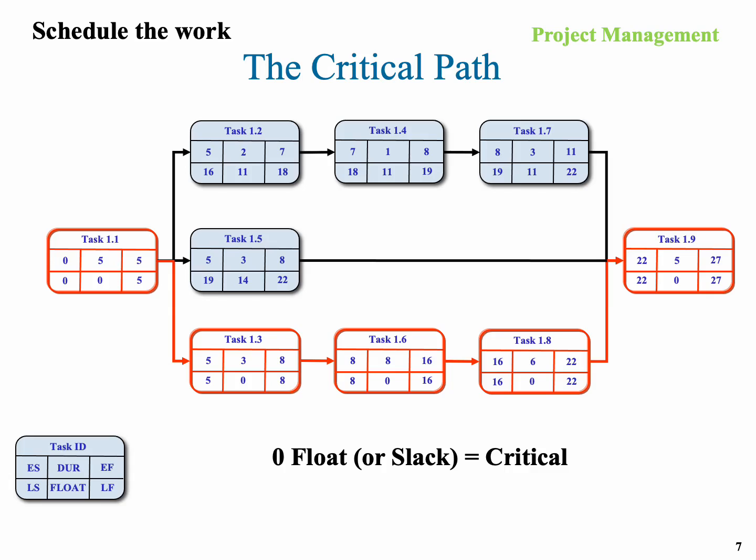So you can see how by determining your critical path, you can allocate resources to make sure your critical tasks are done before some of the other ones that have more flex time. As a project manager, it gives you a lot of flexibility or a lot of leeway where you can allocate limited resources or you can readjust your project to make sure that you are successful.